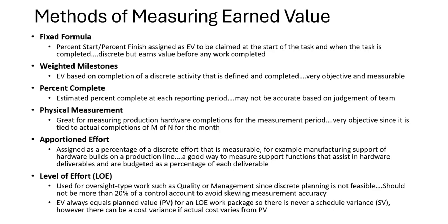So then we come to the percent complete method. Estimate percent completed at each reporting period. I don't like it simply because it uses the word estimate. It may not be accurate based on judgment of the team or the cost account manager that says, okay, I feel like that's 40% complete, so I'll claim 40% of that task as earned value.